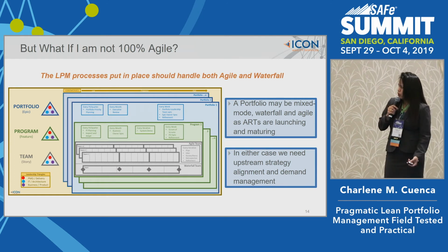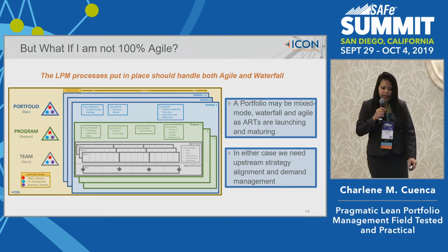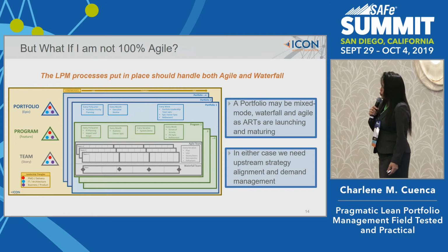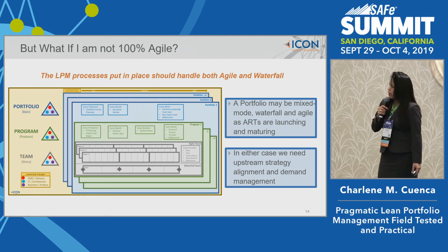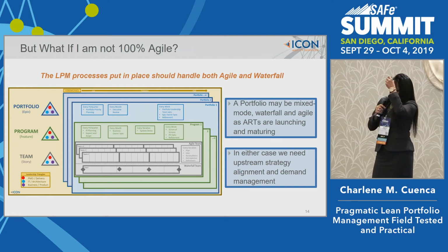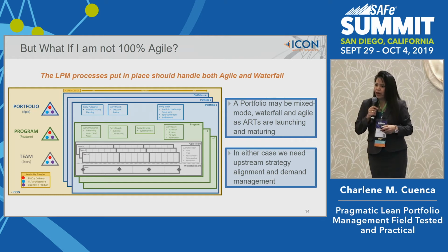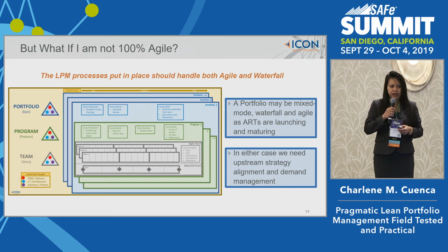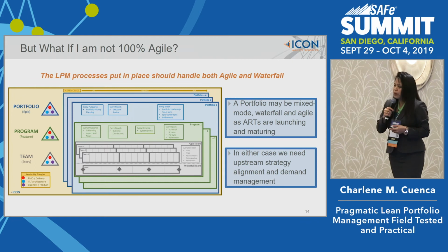Typically, I have my portfolio leadership team looking at the Portfolio Kanban on a weekly basis, maybe if they're new, and maybe that gets pared back as they start to mature their practices. But that allows them to stay aligned, once again, as a cross-functional team on those different pieces that are going through the Kanban. The things that are in implementing: do we still want to continue implementing those things? What about the things that are queued up in the backlog?